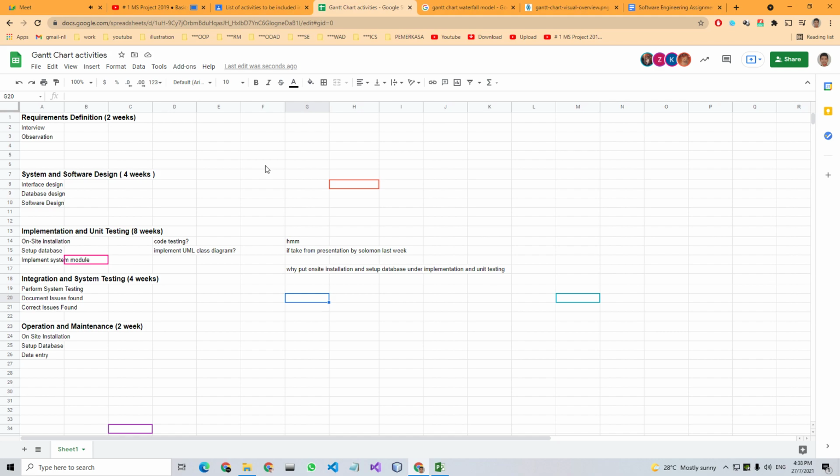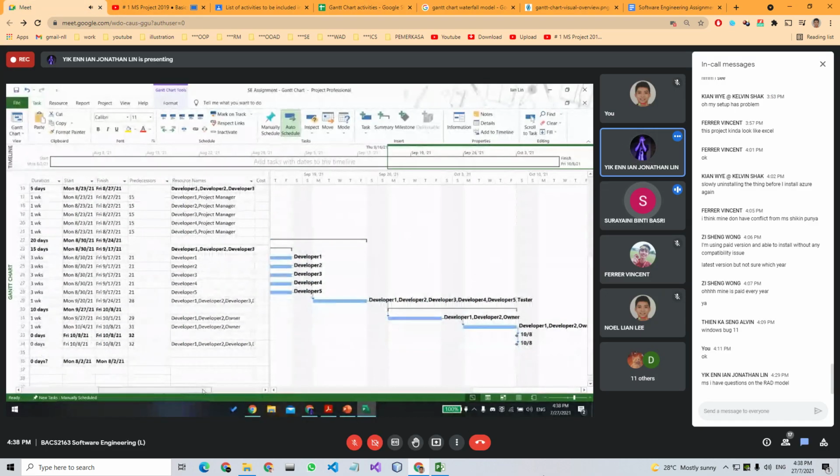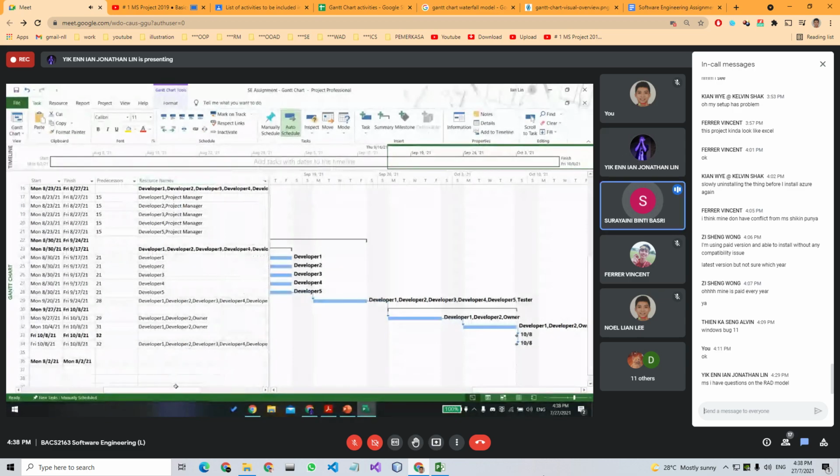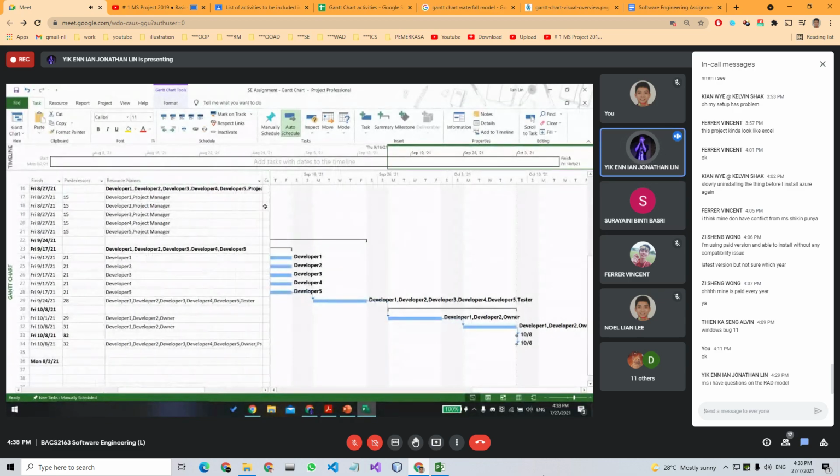Will overview everything. Okay. And then maybe I think you left one important role, maybe tester. Maybe each of the modules should have a tester included. Each module should have one, like here, only one tester. For now, it's not completed yet. So like one tester here.